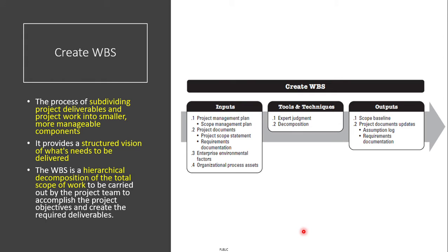Your architect will give you the high level plan and the 3D diagrams, and then you have to bring it down into more manageable components: your electrical components, your structural components, your woodwork, your flooring. So now you start decomposing into more manageable components so that you can draw up a proper project plan and a proper costing for building your house.